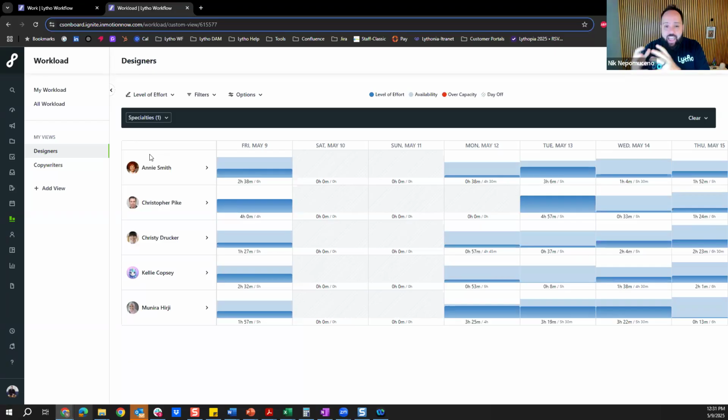So having that actual will really help your team prepare for next time. You can then compare the LOE versus the time tracked and see, okay, we're hitting a good percentage, or no, we're not even close, where the actual is so much larger than the level of effort. We need more capacity, or so on. It will also really help you make those business cases to your team. And we're going to talk a little bit about that later as well.